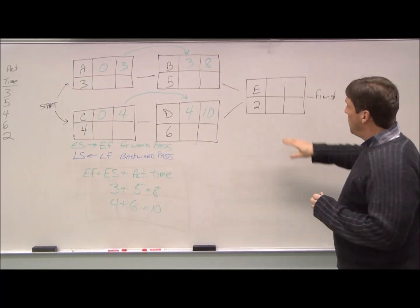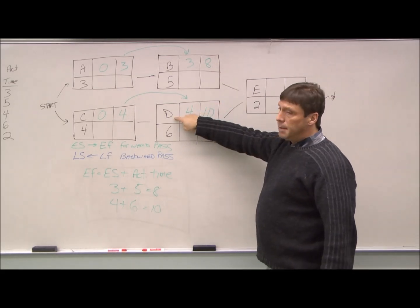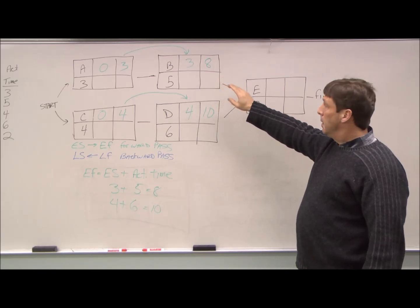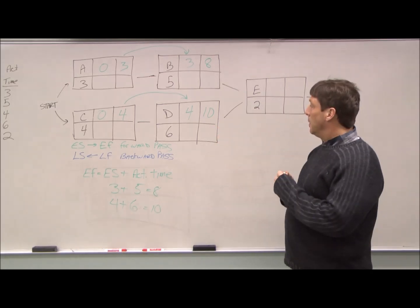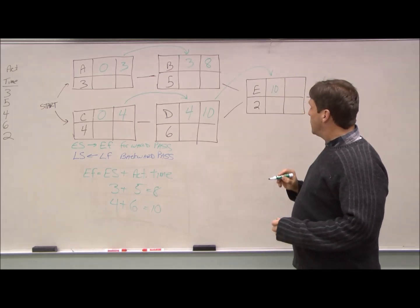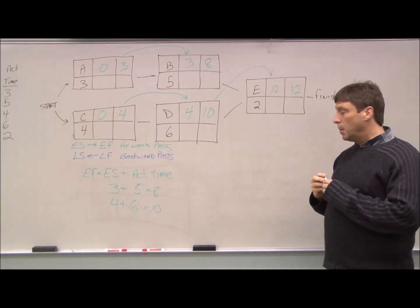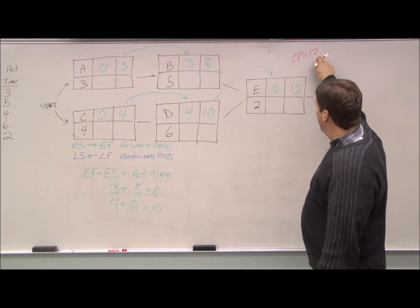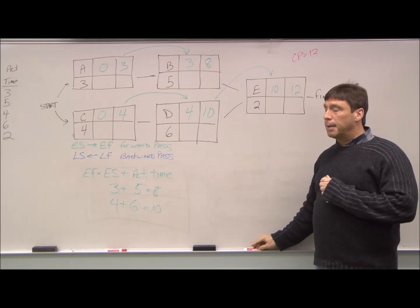All right. Next, we move on to E. E has two items feeding it, both B and D. With this, we can't begin E until both these operations are complete. So even if B is done in eight weeks, we still have to wait the ten weeks for D. So we take the larger of these two, and that becomes our earliest start. Ten plus two is twelve. Now this is where I also told you to keep an eye on our critical path. Because you notice our critical path equals twelve before. These two numbers should agree because we basically mapped out the critical path in time here.